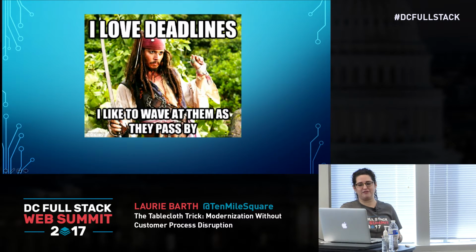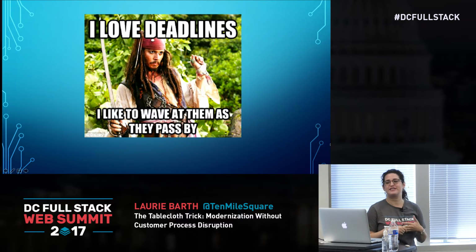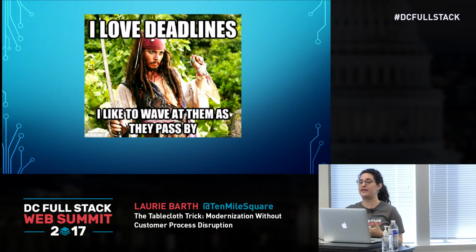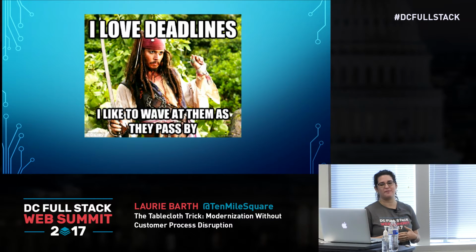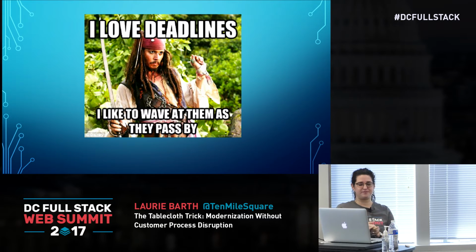Then we have our last fun little scenario. The other thing that happened here was the sheer scale of the project. Having the users do QA and making sure we built each piece the right way the first time was super beneficial, but it took a bit longer. So the problem was we were replacing 5 different parts of the system with a completely new architecture, and only a couple of those pieces were made to be backwards compatible with the legacy system. So it was all or nothing for the rest of the system.